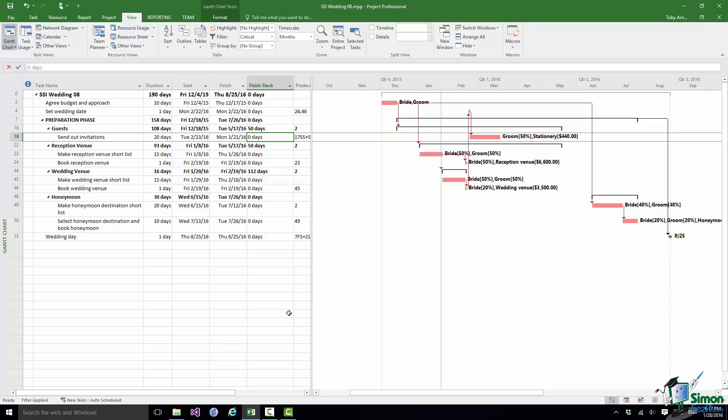In fact in Project 2016 you can change if you like this definition of critical and say for example that any task with two days or less Finish Slack is regarded as critical. We're not going to look at this on this course. For the moment we're going to stick with the standard definition that a task is critical if its Finish Slack is zero days. That means that if it was even one day late it would affect the end date of the project.